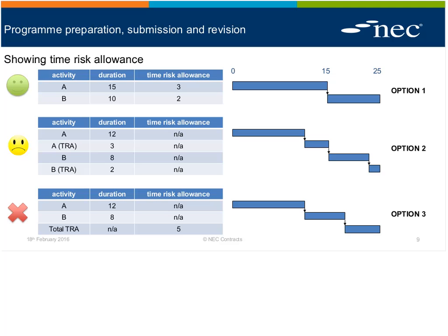Again, my last point is, how do you know where you are with the total TRA at any revised program in time? You've literally no idea where you are. No, I think the bigger problem for me is, whilst it gives you a realistic planned completion, as soon as you go into any level of detail, so activity B, we're being told, by virtue of the 5-day risk allowance there, activity B is likely to be in the wrong place by the entirety of that risk allowance. So it fails for me on the requirement to show a realistic timing order of operations.